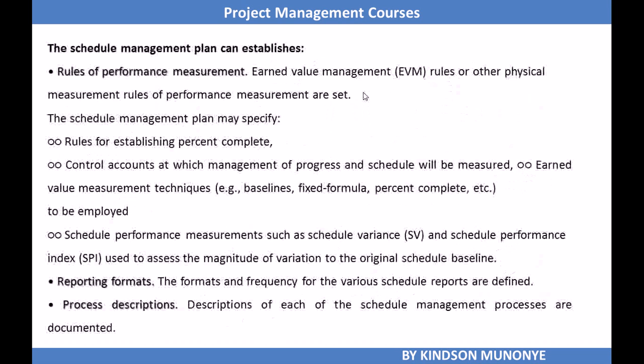Alright, the schedule management plan goes ahead to establish rules of measurement. Rules of performance measurement, for instance, earned value measurements or other physical measurement rules. The schedule management plan may specify rules for establishing percent complete, control accounts at which management of progress and schedule will be measured, earned value measurement techniques, etc. The schedule management plan may also establish reporting formats, process descriptions, and other necessary details.